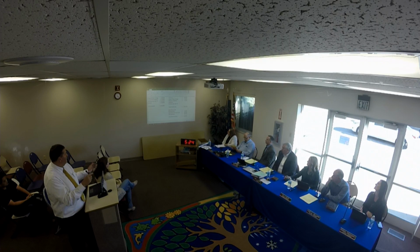What happened to the audio visual? Because that used to be in there too. Has that been taken care of? So the audio visual has been stripped out. There is a minimum audio visual in there, but not what we were hoping to do. Now that we have an audio visual person under contract, we're going to sit down with them and go over what is included and what's not, so that we have an understanding of if we need another $100,000 worth of AV stuff, then we'll bring this back. I mean, we're getting pretty close, but we're not all the way locked in on every single number. So there still could be a little bit of a fluctuation there.